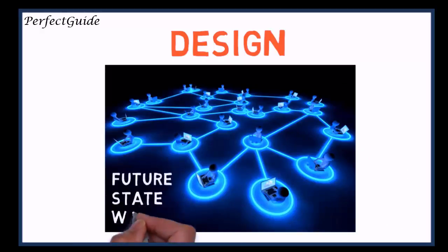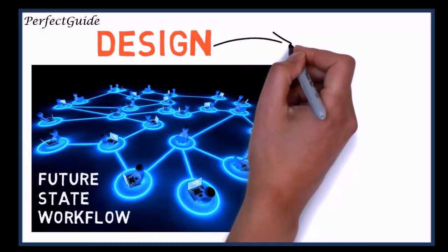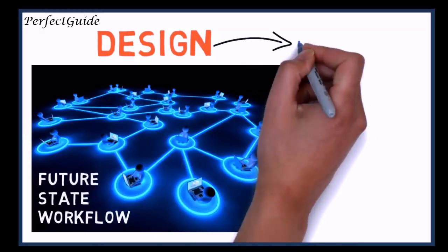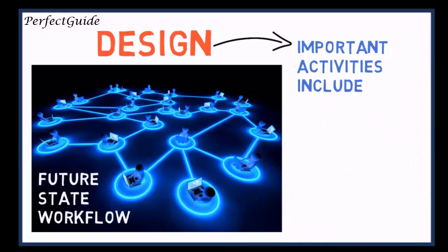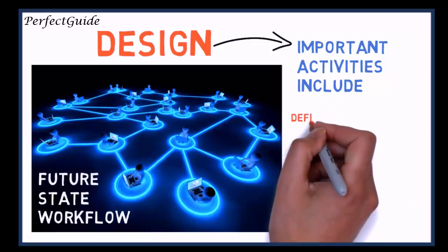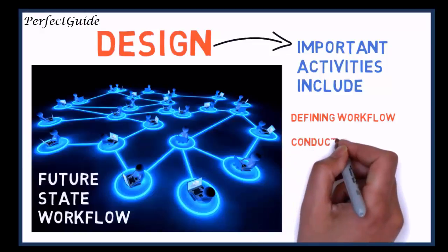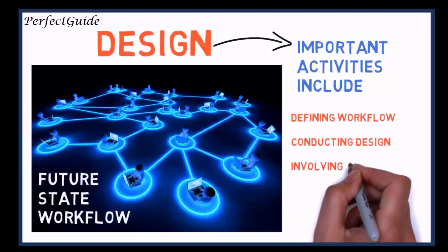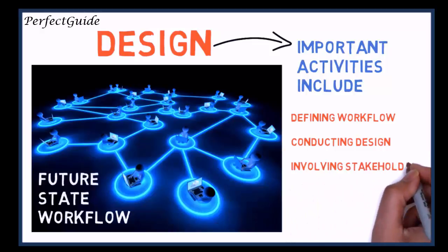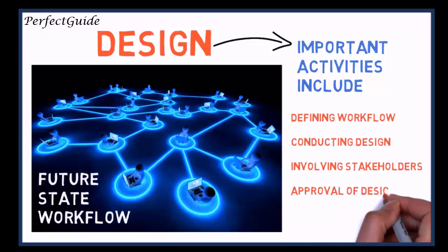Key decisions must be made on streamlining future state workflow, the implementation approach, gaining buy-in from staff, clinicians, and other stakeholders, addressing potential workflow risks and gaps, data migration and integration requirements, and reporting requirements. Milestones and important activities of this phase include defining future state workflow, including system architecture, conducting future state design sessions with appropriate staff, presenting final future state to key stakeholders, and approval of future state design.